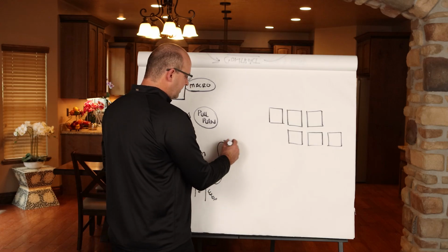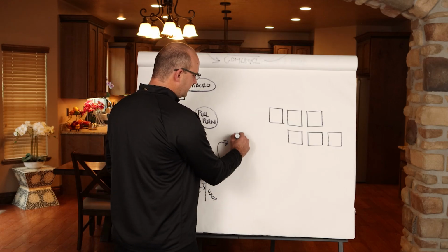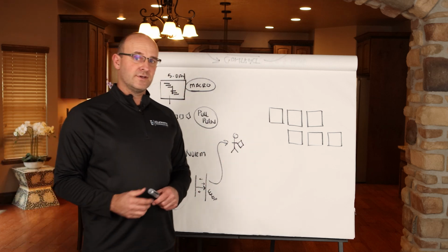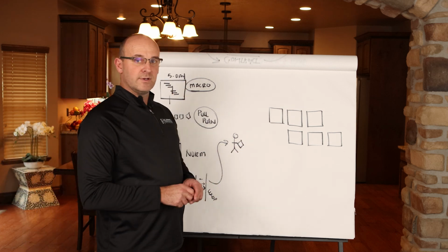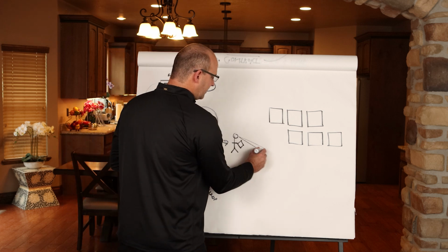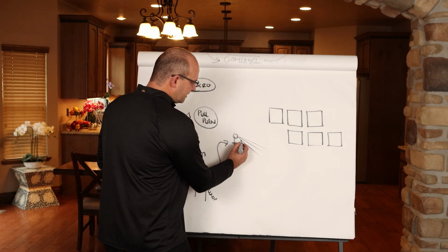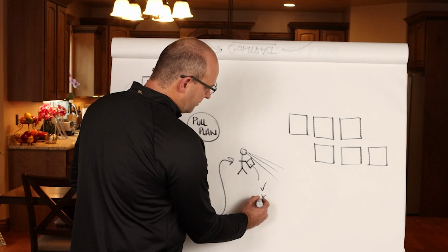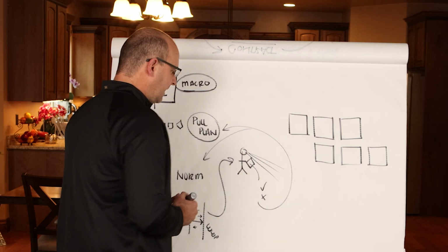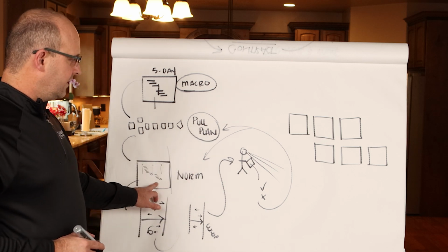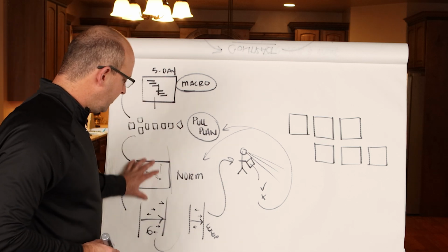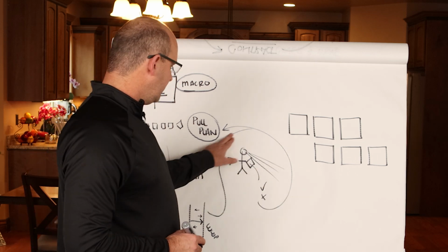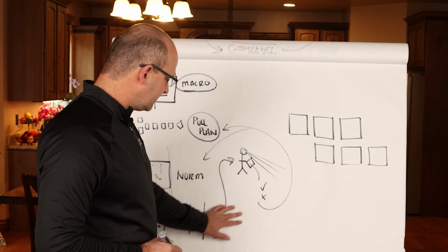Then this weekly work plan goes out in the field and is implemented. And guess what? Every good superintendent, assistant superintendent, field engineer, foreman has the weekly work plan with them in the field. And as they're seeing and controlling work in the field, they're actually updating this with green check marks or red X's. Then that goes back into your norm level Takt plan, and we update from there. And so this is how you update up into when the work happens, and then based on what is actually happening, that loops back into your norm and it follows the same cycle.